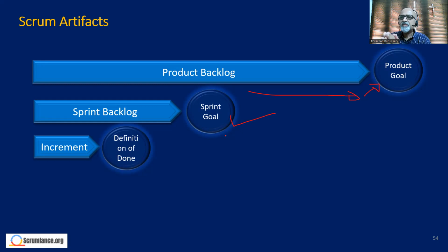Maybe an analogy would be, let us say we are doing the interior furnishing of an office, and we are using Scrum. Now we say, okay, you do a little bit of the visitors room and a little bit of the dining room and a little bit of the office room during the next sprint. At the end of it, we will not get any value except some partially completed things.